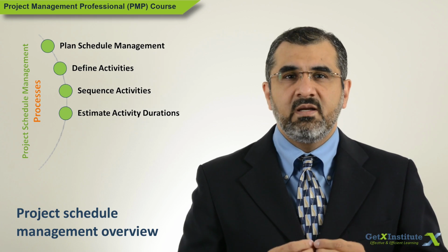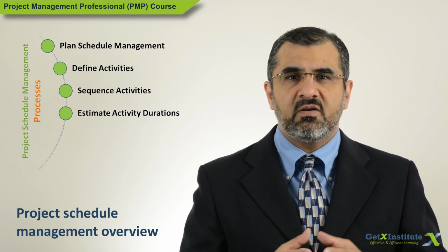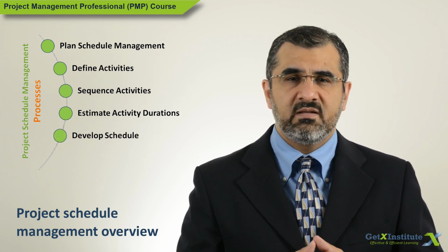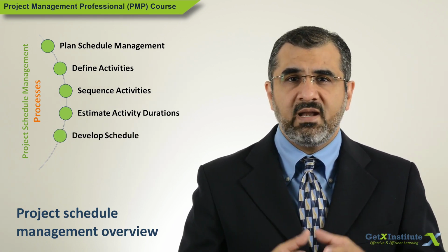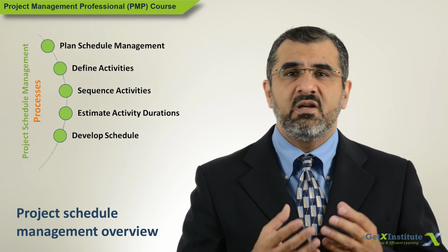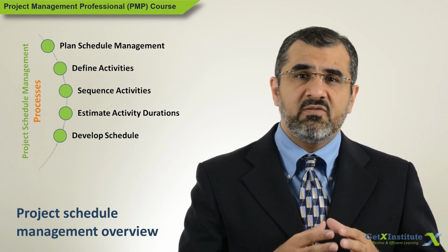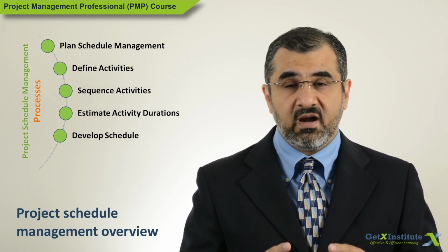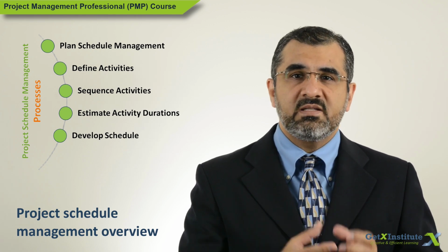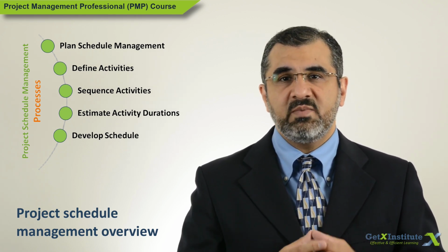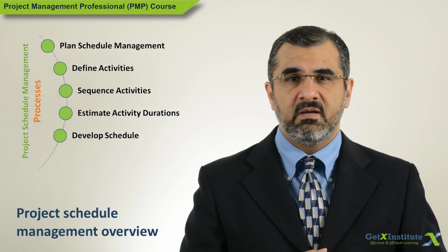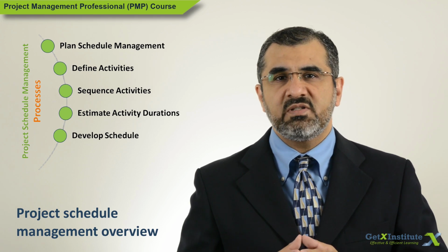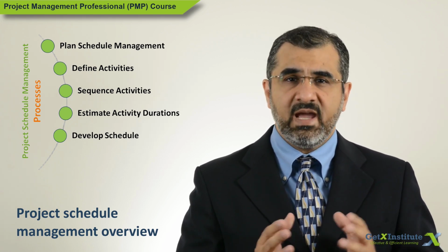At this point, there is a schedule in place, or so it seems, but it needs to be analyzed to make it realistic, make it doable, analyzed and fine-tuned to ensure resources are well engaged, schedule-related risks have been accounted for, and the external deadlines, if there are any, have also been considered, and the schedule has been aligned to those.